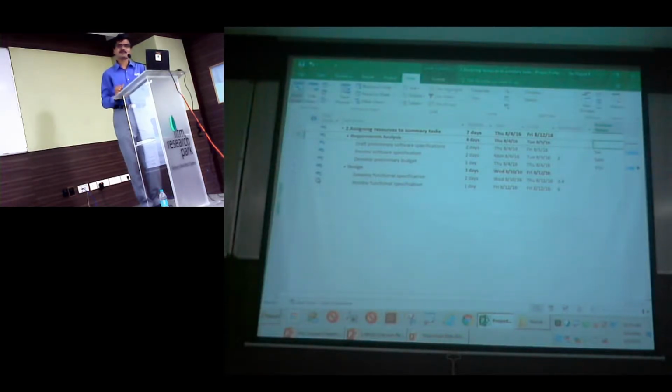But sorry, that can also happen. You can work on parallel tasks. But the point is the red fireman I just talked about. I'm saying within the subtask, a team member can work on both. No problem. You can always resolve it by delaying one of the tasks by resource level. You can delay one of these two tasks to a later date, or you can move one of these tasks to another available resource. That option is available.